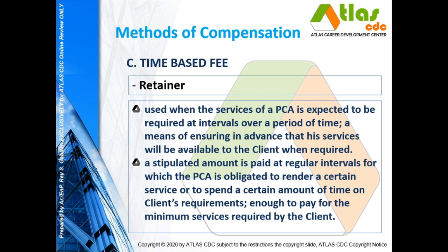A stipulated amount is paid at regular intervals for which the PCA is obligated to render a certain service or to spend a certain amount of time on client's requirements. So this should be enough to pay for the minimum services required by the client.